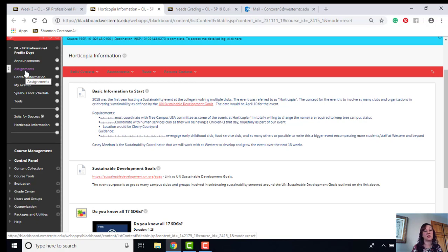As you develop that list, you're going to determine on your Gantt chart where that task or responsibility needs to take place. How do we need to plan this out? None of these are going to be perfect the first time around because you potentially don't know everything that needs to occur, and that's fine. But I want you guys to start individually planning how we're going to get from today to actually having this event take place on campus, and what are all the things that need to happen in between, and place those on the Gantt chart so that we have a visual representation of how this event is going to take place and how we can execute it.